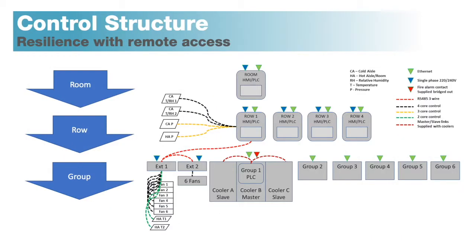First one, controls. As Jonas said, these guys are running fast projects. They've got minimum cost objectives. So the one thing is building equipment, but the other thing is creating a control system which is remote access, remote configurable. What Jonas said is we trained them how to do the first installation of the cooling and the rack system, but we set up the first control system, and then for the remainder of the project this has been all remotely commissioned, because running projects is complicated.